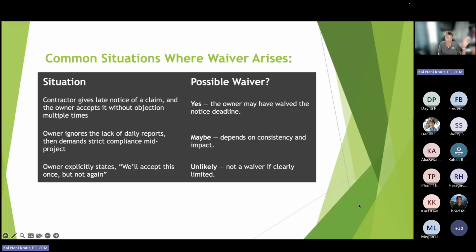I'm actually dealing with this right now, again, this is all Makaha stuff. The contractor told me, well, we didn't think you were going to impose liquidated damages. So now they're doing a time impact analysis. I'm asking, where's your notification? You can't do this at the end of the job just because we're applying LDs and now you're saying, oh, well, I had time. You didn't provide notification. Again, not sure how successful we're going to be, because on that project we asked for notification. We got notification. We got written extensions. And there are these little things that they're realizing they didn't do, and now they're asking for compensation. You know, the first line of defense is to deny. So we'll see how it goes.